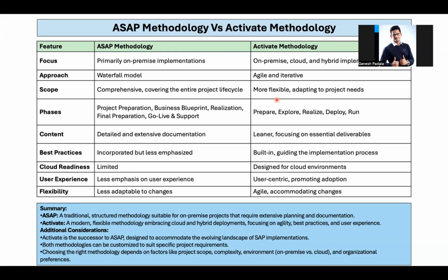So we have to move in somewhat of a waterfall method, but the sprints will be helpful for project management to segregate the work and see the deliverables. If you want to achieve 100, how do you split it into 25, 25? So for this 25, the next 3 weeks, for the next one, 2 weeks, the next 3 weeks, like that you can plan the sprint based on each phase of the activities, and the timeline can also be decided. All the 25s don't need equal time, right? Certain 25s need more testing and all. That may be 3 weeks, another one is 2 weeks, another one is 4 weeks. Like that, you can plan.